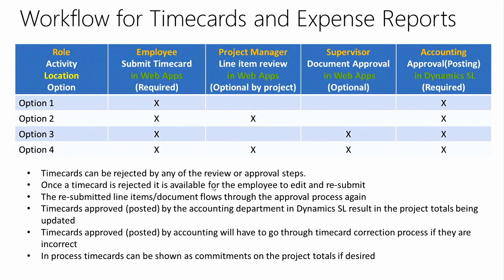So once the time card is rejected, the employee can re-edit and submit it. The last point on this slide says the time cards can show as commitments. So anytime a time card is in process, it will display as a commitment on the project.